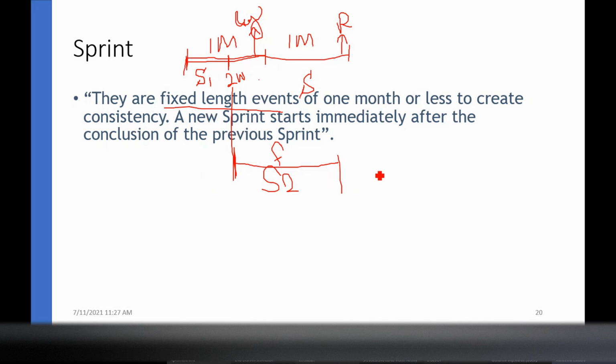From the business perspective, we as software developers are getting a huge benefit, because we can bill for these 2 weeks even though there's no output. It's not our fault. It's not the fault of our customer either; it's the requirement of our customer. Either way, we have done our work. We have put in some effort, so we can bill for that. We can take money for these 2 weeks,